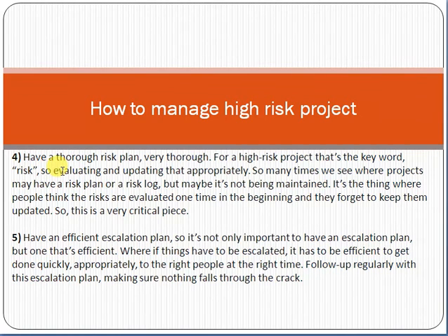Then you should have a risk plan, in your mind and in a document. First of all, we have to identify the risks which can occur in a project. Then we should have response planning against those risks. If any particular risk occurs in a project, how will you handle it? This is called risk response planning. And to handle the risk, someone should be assigned as well. Like person ABC will be responsible for handling that particular risk if it occurs. It should be properly documented and properly circulated as well.